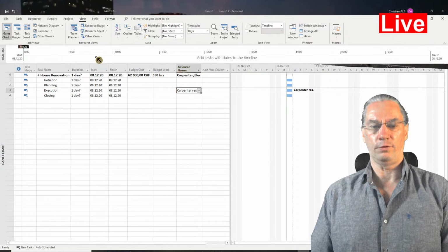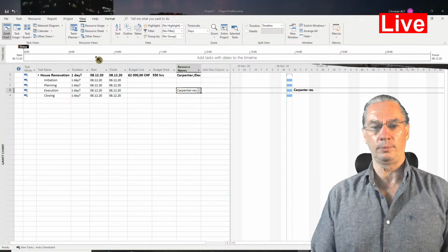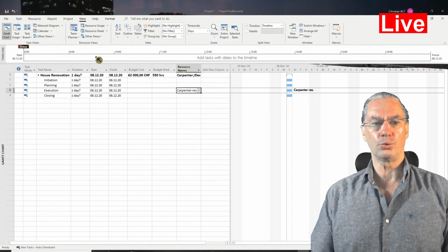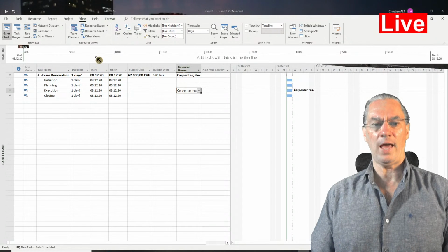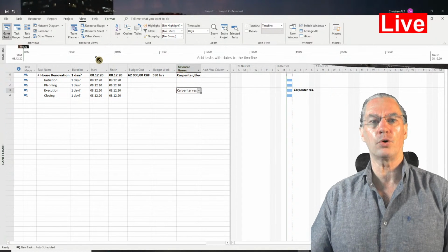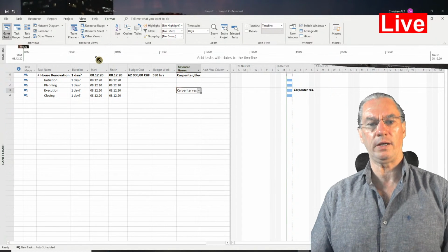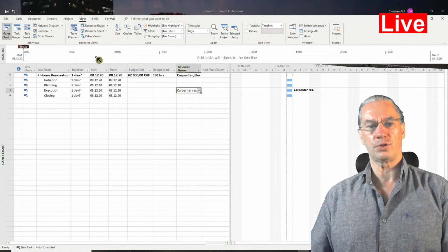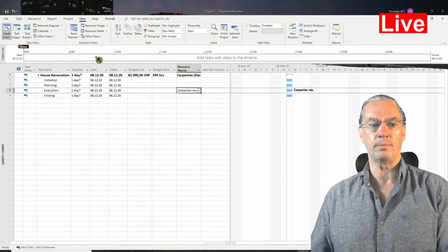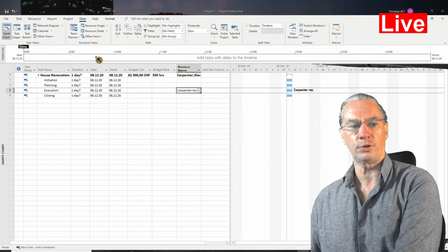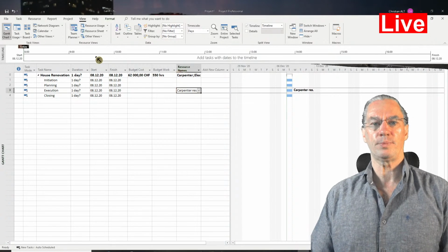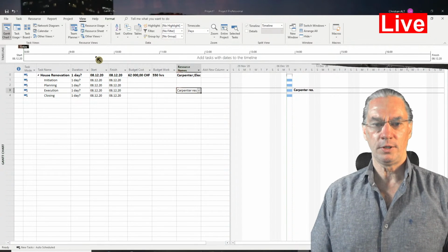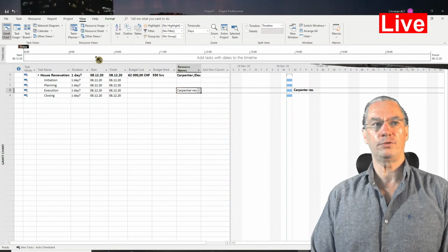In that house renovation, for example, we had to redo the facade, and the people had to take holidays. So of course those points were important. We had to show the stakeholders that the work would stop for a period of 1 month and start again after. That's why the delivery of the complete project was postponed by 1 month. So these are things you have to do.